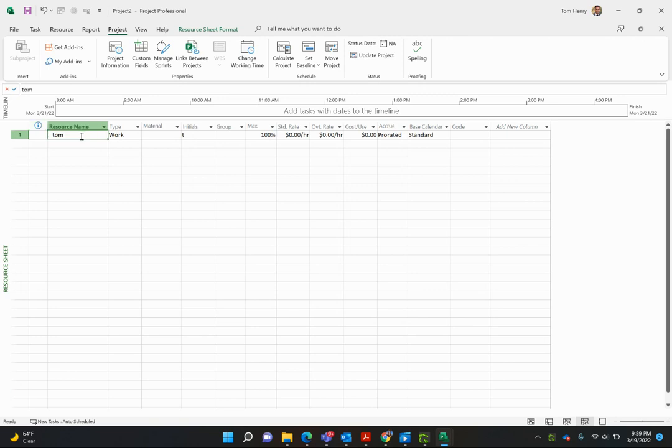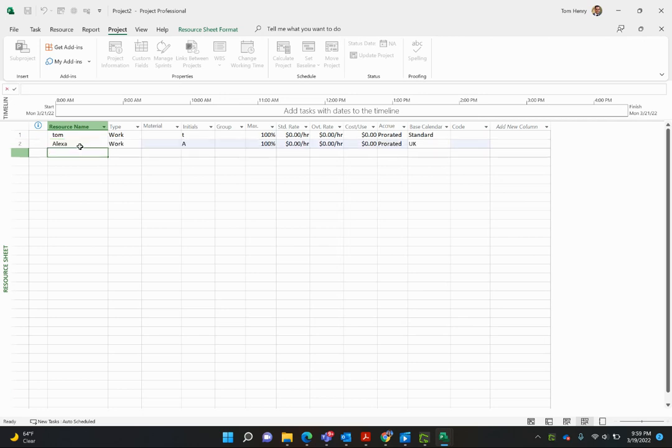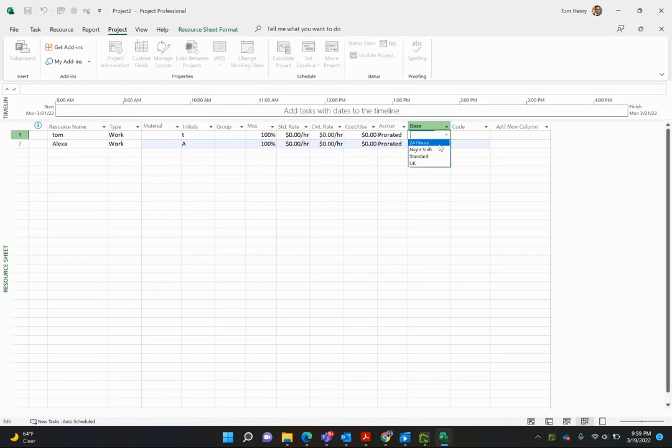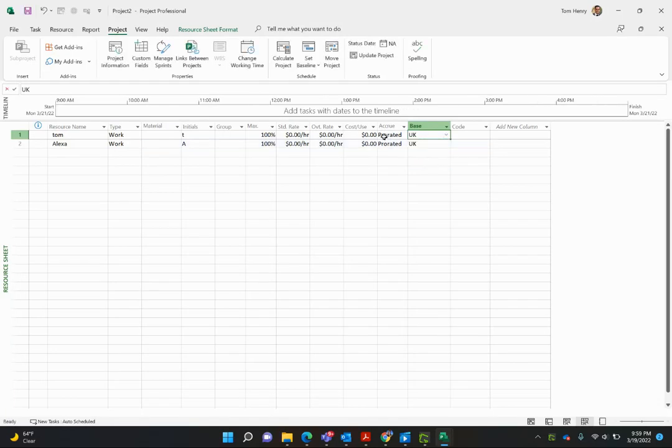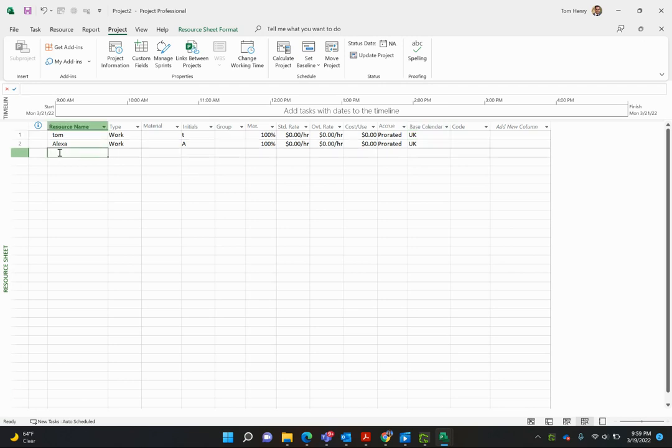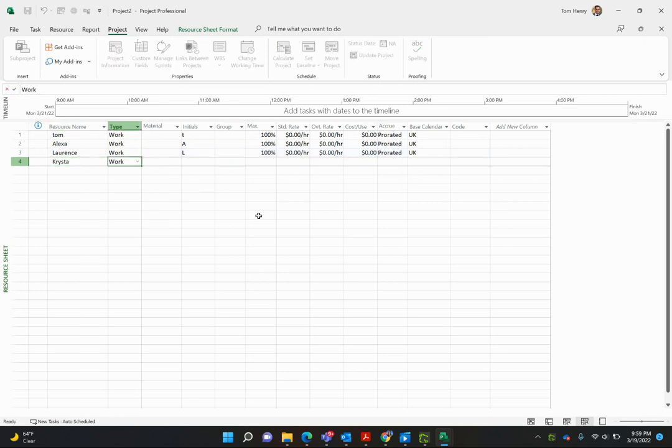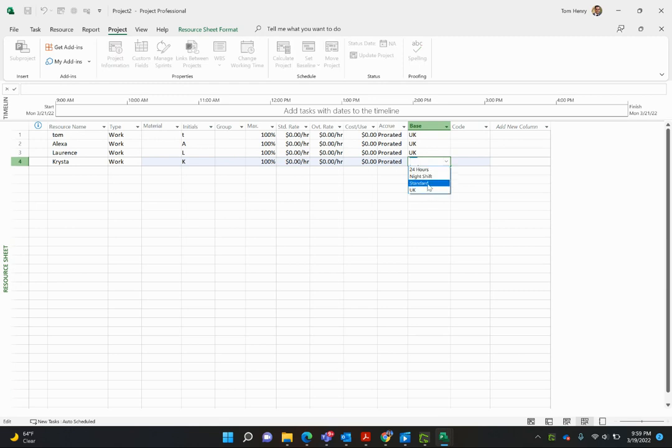You must always set the project calendar as the UK calendar. That's the standard for tasks, and then the resource calendars will be slightly different from there. Press OK. Now, by default, if I had a second resource, I'm going to add Alexa here. You can see now, by default, there'll be the UK calendar. That's the project calendar. So make sure you set the project calendar for all your resources before you create them. Then, by default, they will get that UK calendar. If you want someone to work in the UK, my brother there, Lawrence, we'll put him as UK. If you want someone in America, we'll put someone in America also. That's my wife, Krista. We'll put her on the standard calendar.